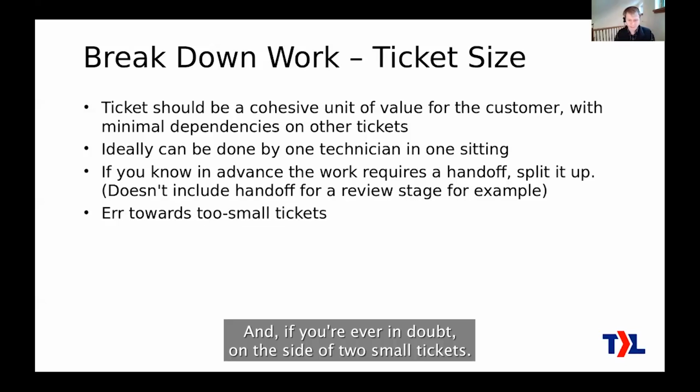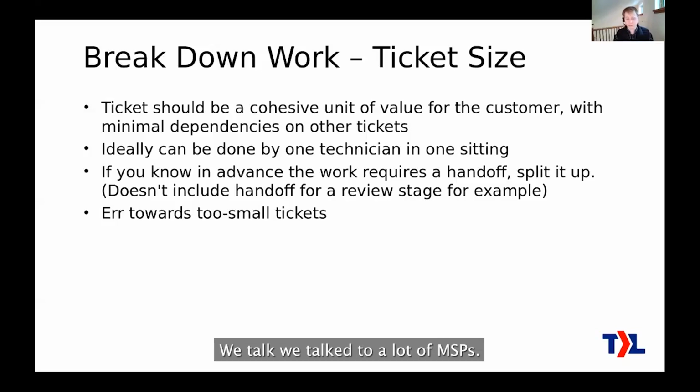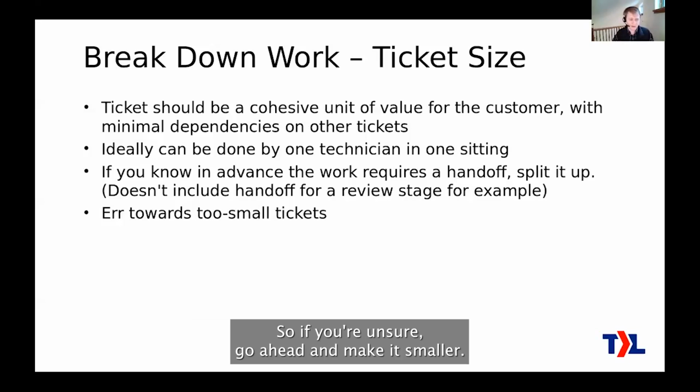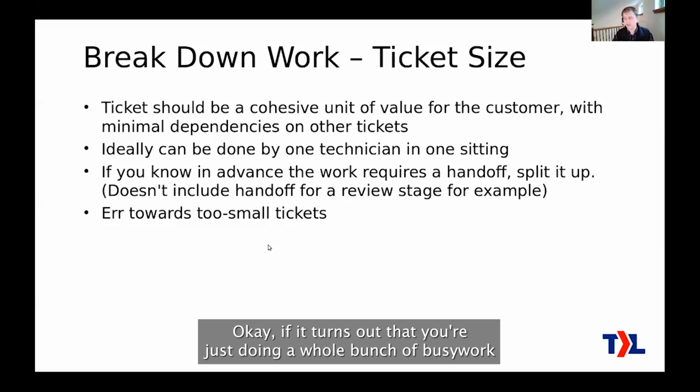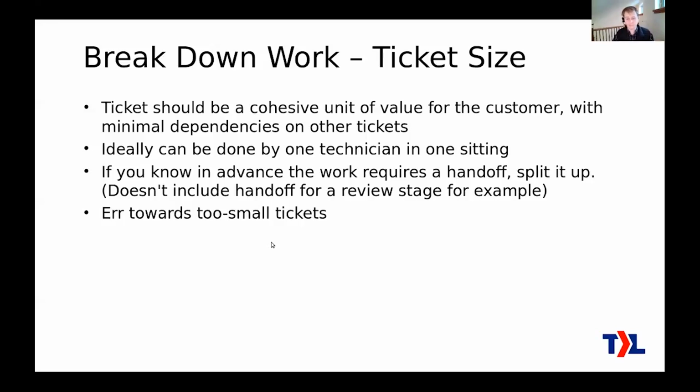And if you're ever in doubt, err on the side of two small tickets. Okay, I've rarely seen that problem in the real world. We talk to a lot of MSPs. It's much more common to make tickets that are too big versus too small. So if you're unsure, go ahead and make it smaller. Okay, if it turns out that you're just doing a whole bunch of busy work because you made your tickets too small, okay, well then go fix it, or next time do it better.